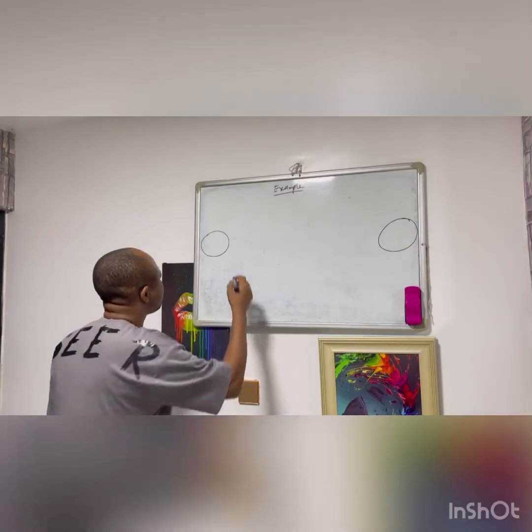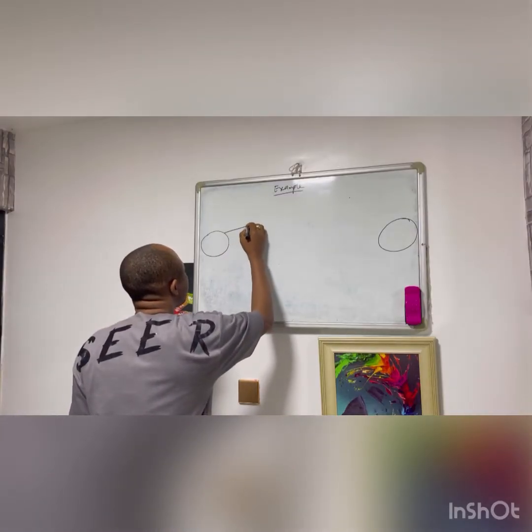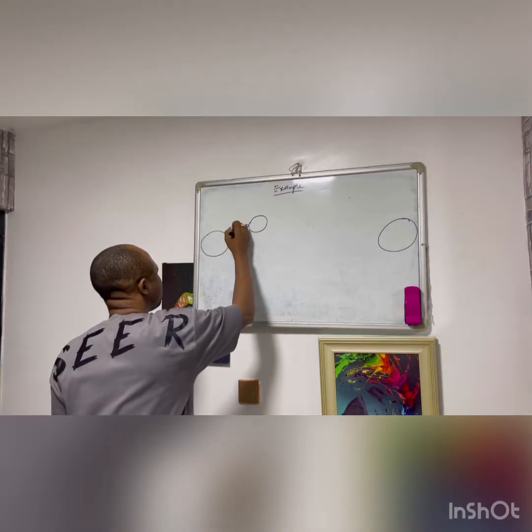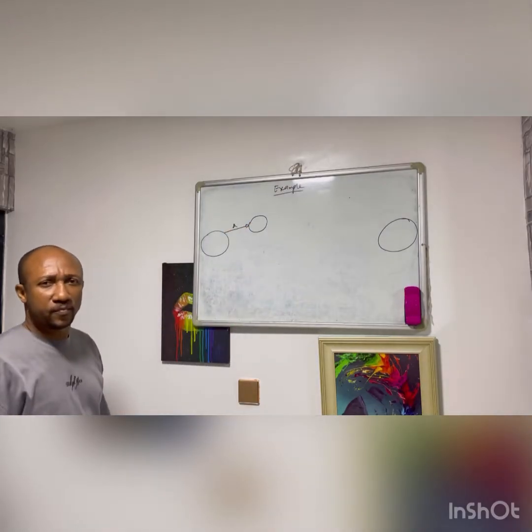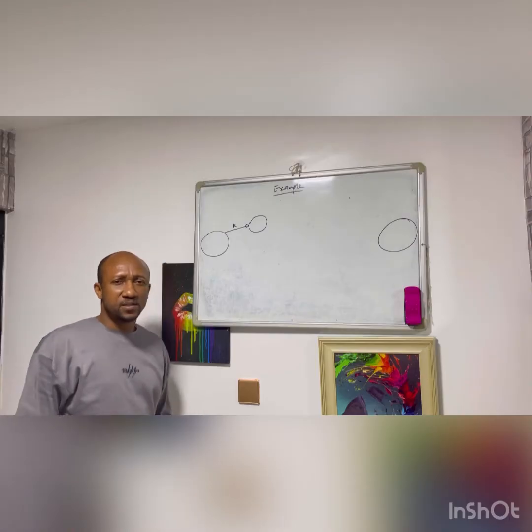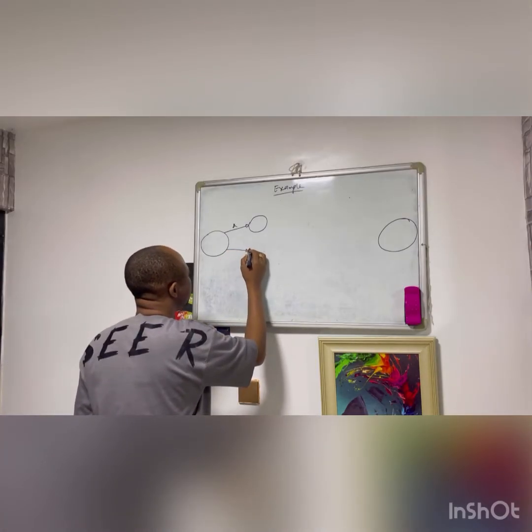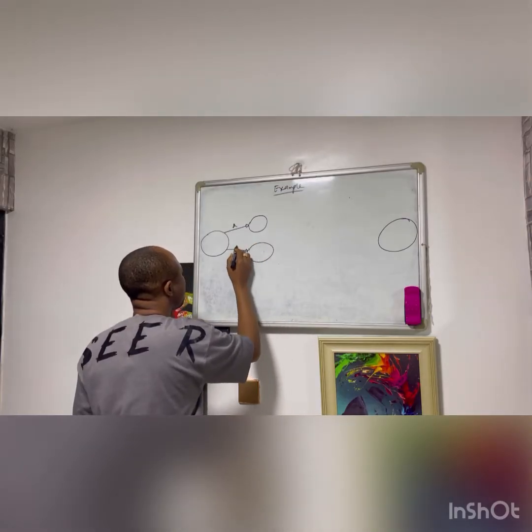So I can draw activity A from the source and end it with this circle. The same thing with activity B, it does not have a preceding activity, so I can draw activity B facing its own direction.